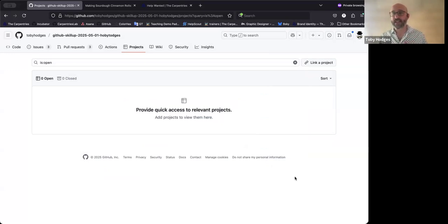And they're a way of collecting together issues potentially from multiple different repositories that are related somehow in a particular project. And you can create what's often referred to as a Kanban board, where you organize these issues into different categories based on whether they're still waiting to be worked on, whether they're in progress, whether they've been dealt with, and you drag and drop these cards around across the board.